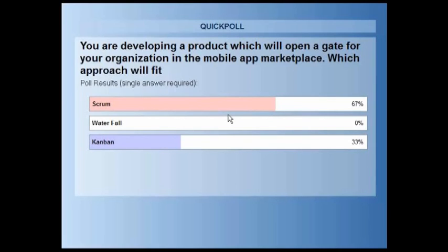Okay, so the question is: explain why Scrum is not for complicated systems but for complex systems. The complicated system is very near to the defined system or a simple system, but the quantum of data is too much. A Six Sigma kind of approach works well for a complicated system. It is not that you don't know what will work. You have things which have been working. You have input data, you have output data.